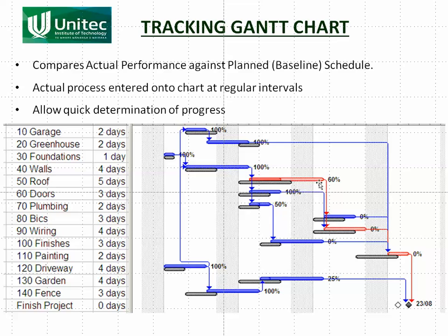So what this tells us is because this ran a week late, then we're going to start this one later than what we anticipated, and we're going to start this one later than what we anticipated, and we're going to finish late. So it's a very powerful way of estimating what's happening.